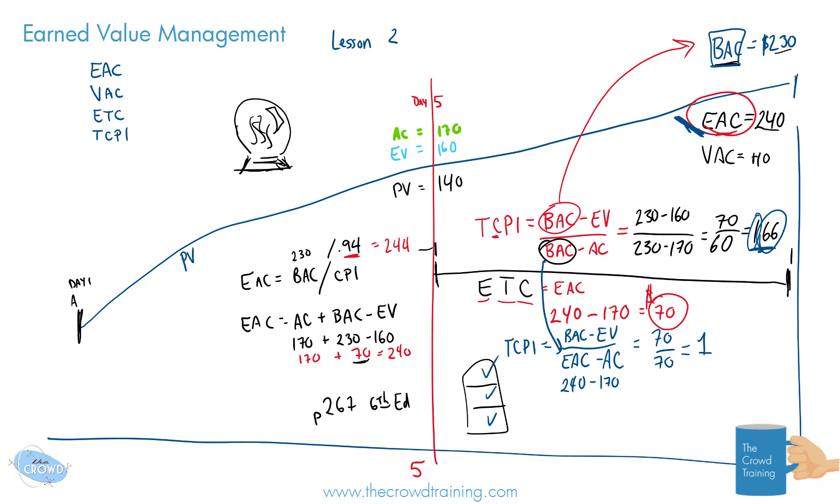So this is where you would use if you have a new milestone or a new target in which to reach and you are then calculating towards that new target. And you can fluctuate that number based on the efficiency needed, based on what's approved and what is desirable by the organization and maybe even the sponsor. But two different ways to look at the to complete performance index, depending if you're using the original budget or a new estimated budget at completion.